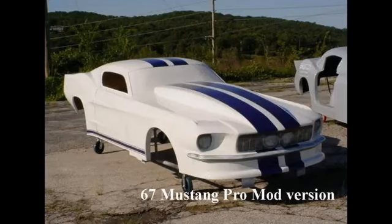Testing needs 2 test drivers for 15 days each at $175 a day, totaling $5,250. Labor. High-octane racing fuel, advanced telemetry equipment, and specialized lubricants provided by Apex Lubricants cost $13,250. Materials. Budget impact. Time-phased budgeting allows LJRC to strategically allocate resources throughout the project.